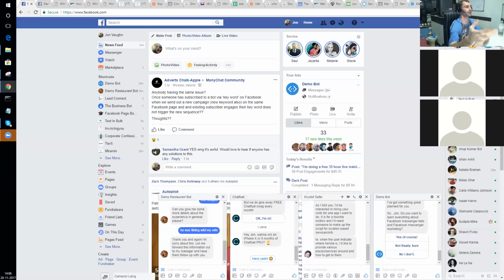Because if we say something is going to take 40 hours of production, that may not necessarily mean you'll realize that in a week. It may be 3 weeks before we actually give you those 40 hours' worth of development. So we outline all that in the project plan. It outlines how many production hours are involved, how many delivery hours, and when you should expect to see these things delivered.